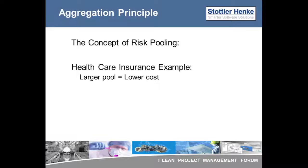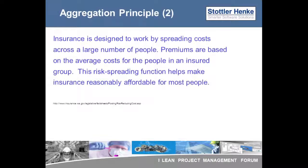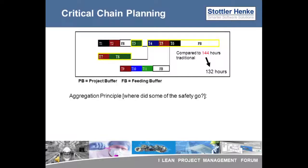Similarly, by pooling the risk over the entire project, fully protecting each task becomes unnecessary and the sum of the protection needed is less. By applying the aggregation principle, the amount of protection required in a schedule decreases as the number of tasks being protected increases. A series of tasks protected at one location requires less protection than if each task were individually protected.